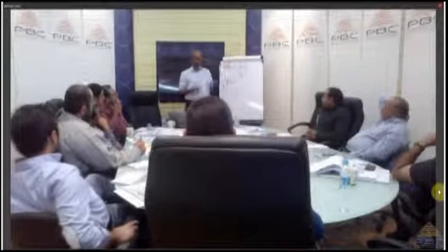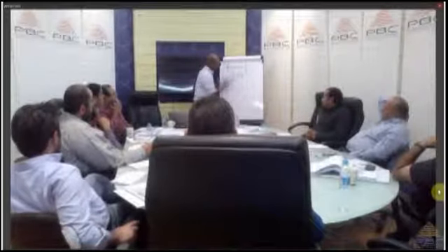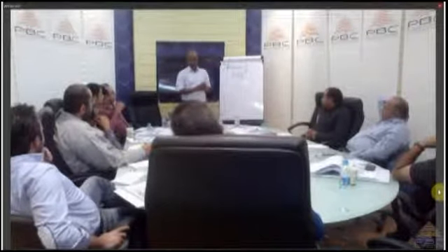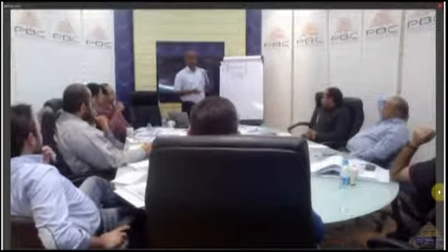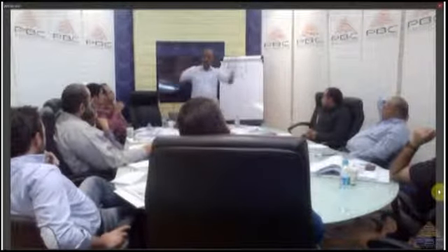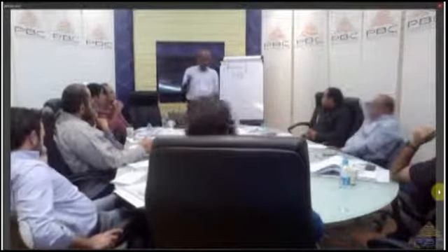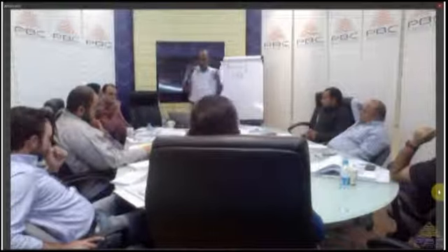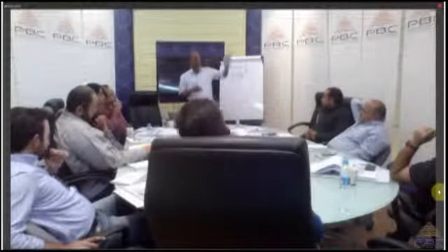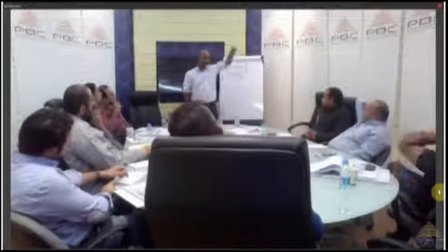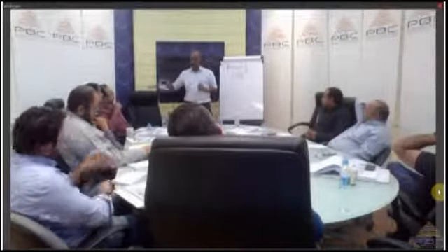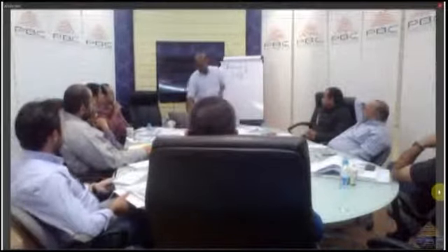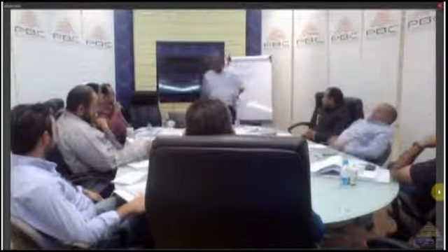However, if I have a factory of baby food or medicines, is this an option now? No, because one mistake can cost me my entire business. So it's a cost benefit analysis. You have to put that in mind. If I'm building a 50-story tower, what are the quality procedures and the cost, versus if I'm building a villa for a client in the middle of nowhere? Again, cost benefit analysis is one of the techniques we use to create our quality.